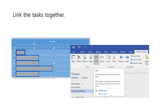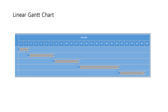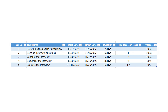To link the tasks altogether, select all the bars on the Gantt chart and go to the Gantt chart menu and click the Link button. Now the tasks have been linked together. However, the tasks are arranged in linear form — that is, the tasks must be done one after the other. In our example, it doesn't have to follow a linear structure, as tasks 3 and 4 can be started at the same time right after we finish task number 2. Refer to the predecessor task column of our work breakdown structure.